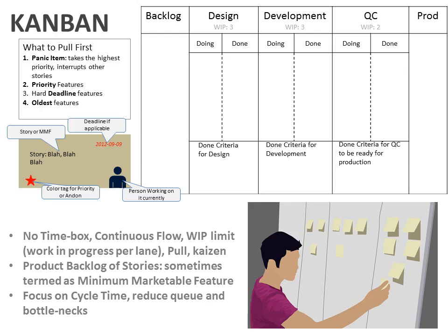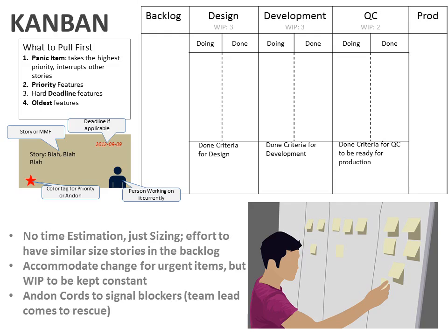And there can also be prioritization, an expedite lane by the color, or if there's a blocker, there can be a color code to define it. So this is more in line with how some of the other online boards are. There is generally no sizing or time estimate, and the focus is to basically ensure there's a continuous flow that's achieved.